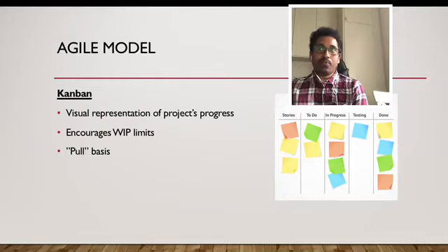So that's why it is important in Kanban to have this limit on the number of tasks on the board. If you don't have that, the other problem is when you run into a problem, you just keep the task there for so long, and that is not really good for the project. We don't know the bottlenecks and what the blocking problem is, and this is how it can be visualized by this board.